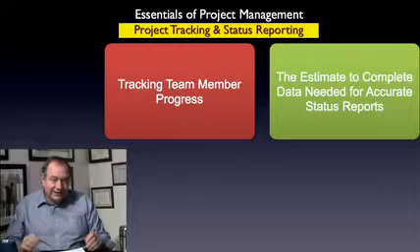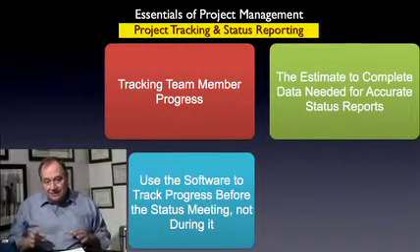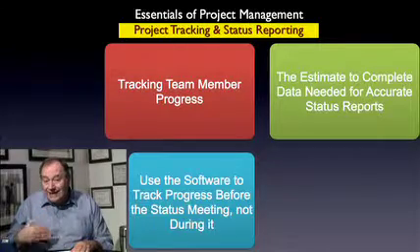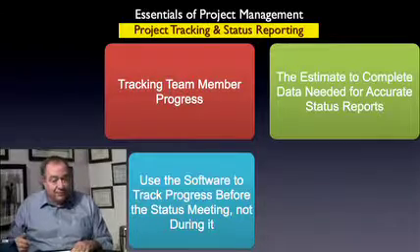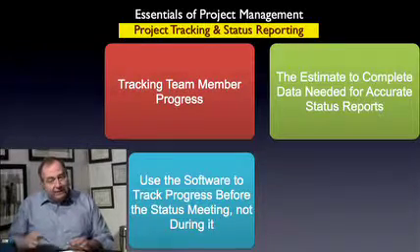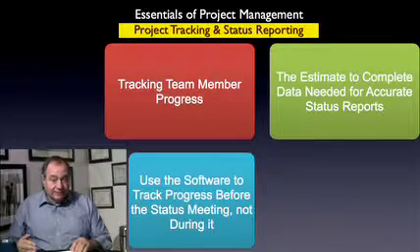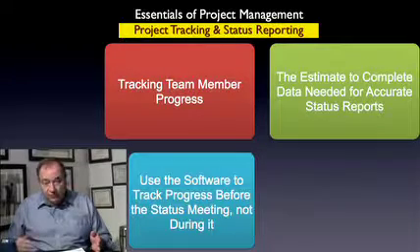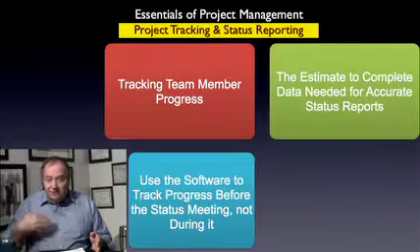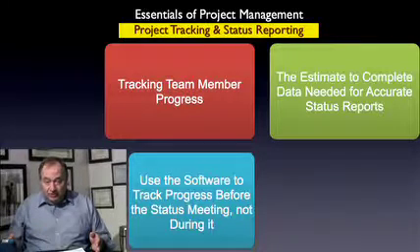It's critical to get the estimate to complete each week because that is what makes your team members become better estimators. It also helps them anticipate problems that may arise. If each week they are making a new estimate to complete and comparing it to what they originally estimated for the task as far as the hours of work, their skills and their understanding of estimating get better and better very, very quickly because they're practicing it each week.